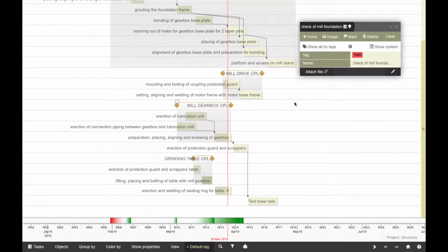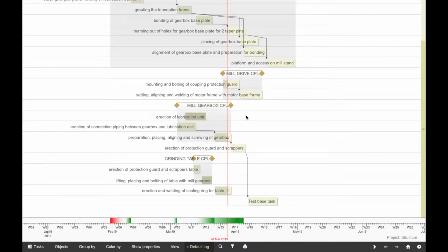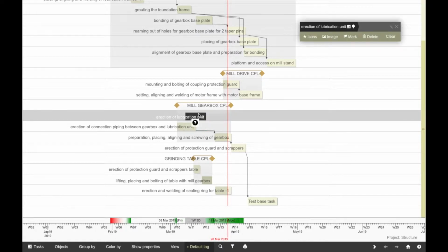The main difference of the given scenario from a simple Gantt diagram lies in the fact that a task or its part can be presented in three states: a plan, test, and fact. If a task or a part of it is on the right of today line, consequently it is considered to be a plan. If it is located on the left, it means it is in the test mode and its color is darker. A double click on the task in the test zone transfers it in the fact state and it is considered to be complete. The fact mode, in contrast to test or plan states, can't be transferred, but it can be changed to test mode by a double click.